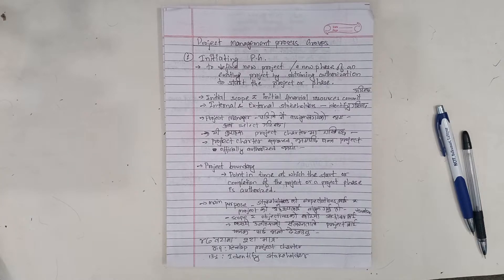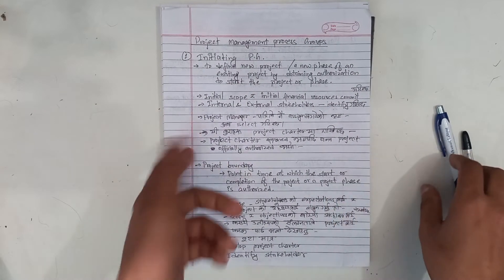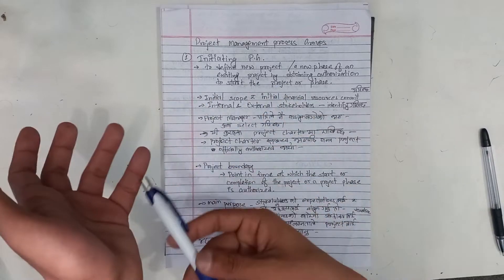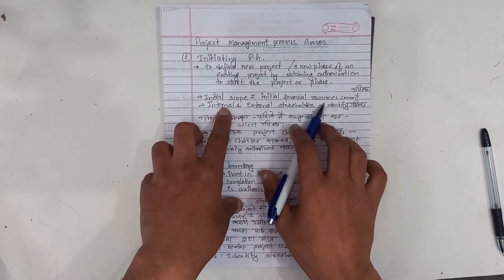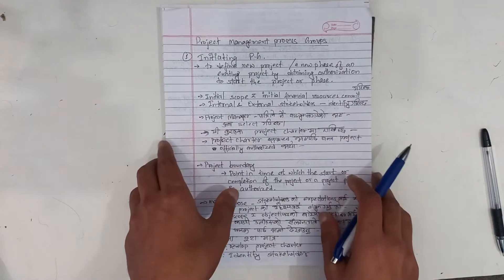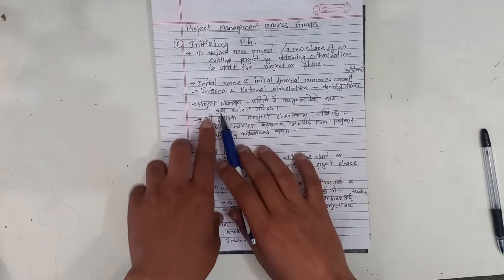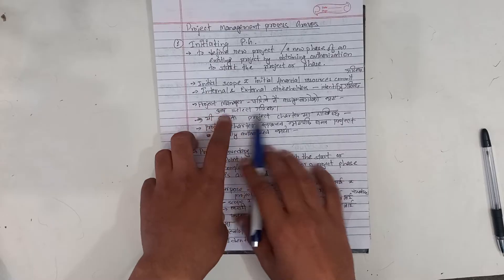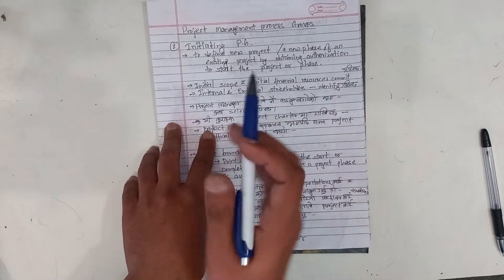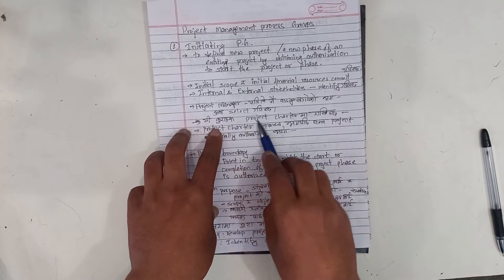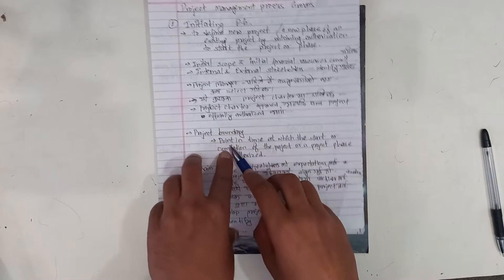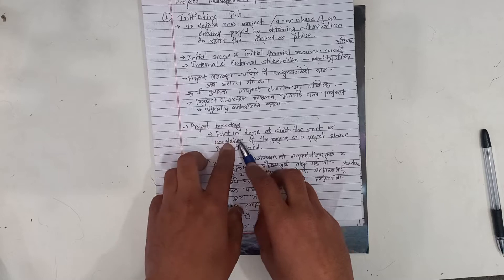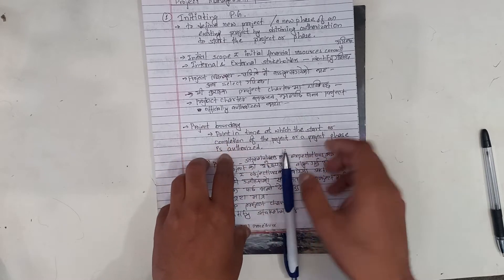To define a new project or a new phase of an existing project by obtaining authorization to start the project or phase. The new project begins or the existing project begins. Initial scope and initial financial resources are committed. Internal and external stakeholders are identified. The initiating phase is the entry point. This is the project charter — the project charter is approved and the project is officially authorized. The project boundary is the point in time at which the start or completion of the project or project phase is authorized.